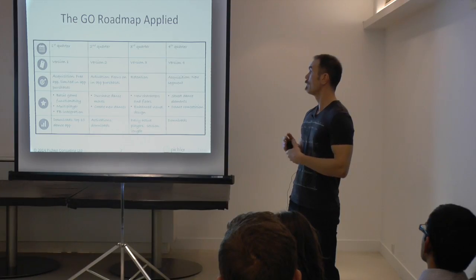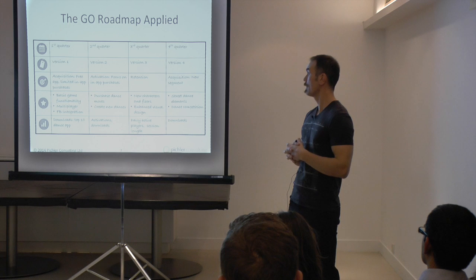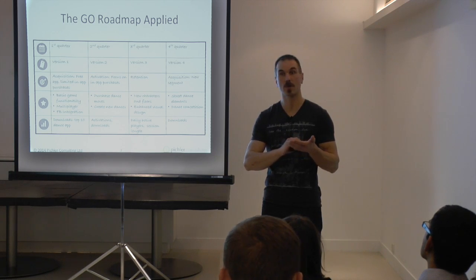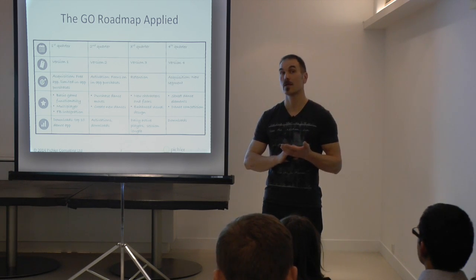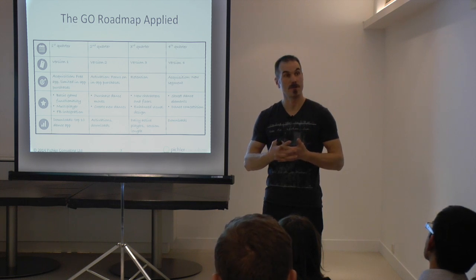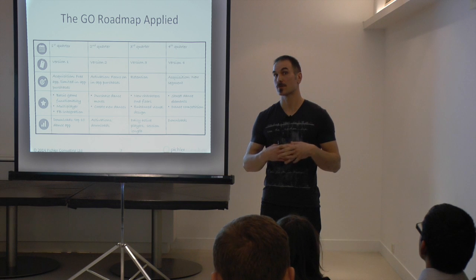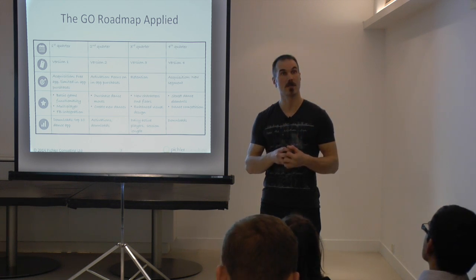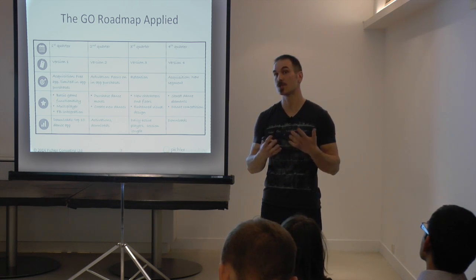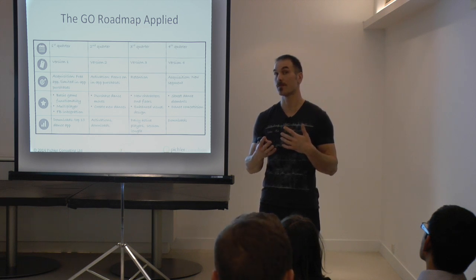That's my version of an Agile product roadmap. Again, it is based around goals. And again, I'd like to encourage you to first and foremost think about goals before you think about features. So first ask yourself, why should we really create a release? What are the desired benefits? Why are we doing it? And then figure out what the features are. And I would also like to encourage you to think about KPIs and metrics so that you can measure if you've achieved your goal or if you haven't.